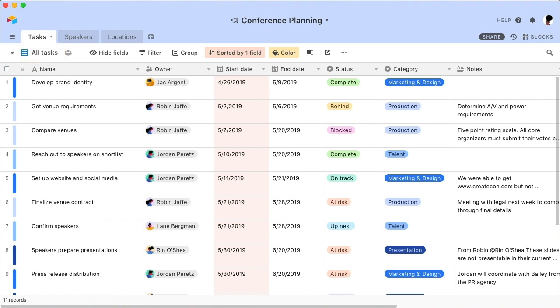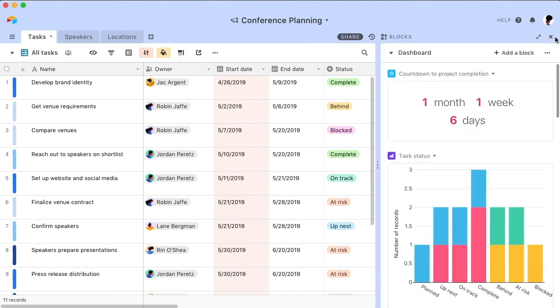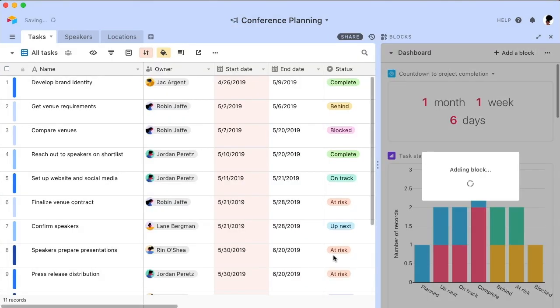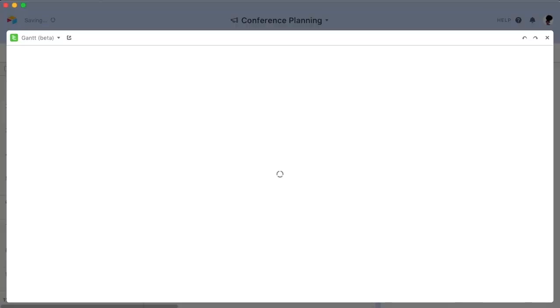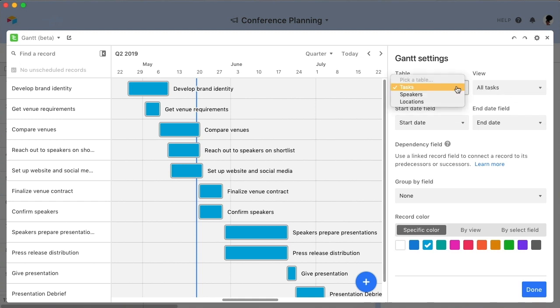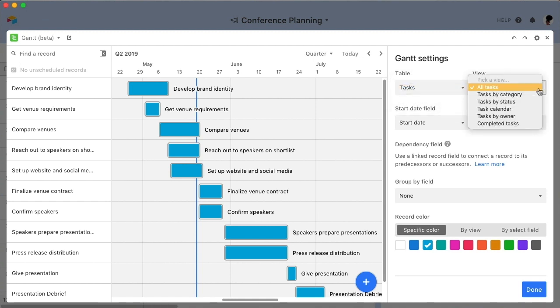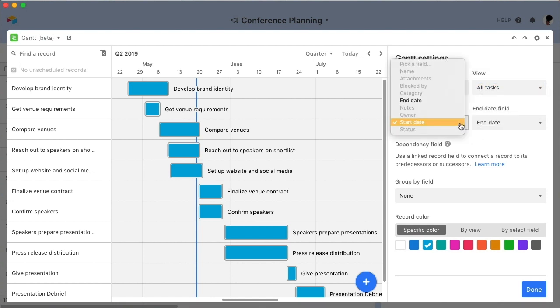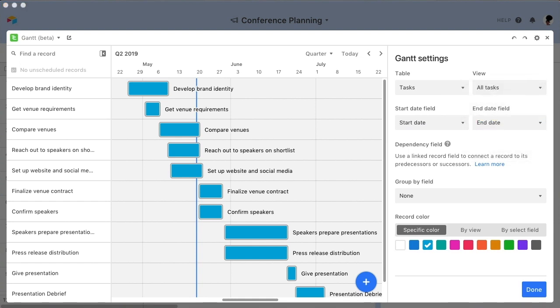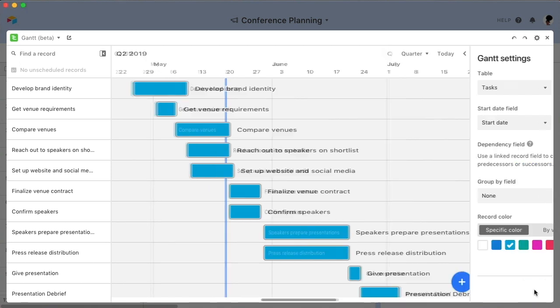Now let's unfurl the Blocks panel and add a new Gantt block. Using the Settings panel, we can customize our Gantt chart. The block will have already pre-selected the table and view that you currently have open, so change these options as necessary by selecting the table and view you actually want to pull from. Next, you'll need to pick a start date field and an end date field. These fields will be used to define the duration for each record and plot your records on the chart.